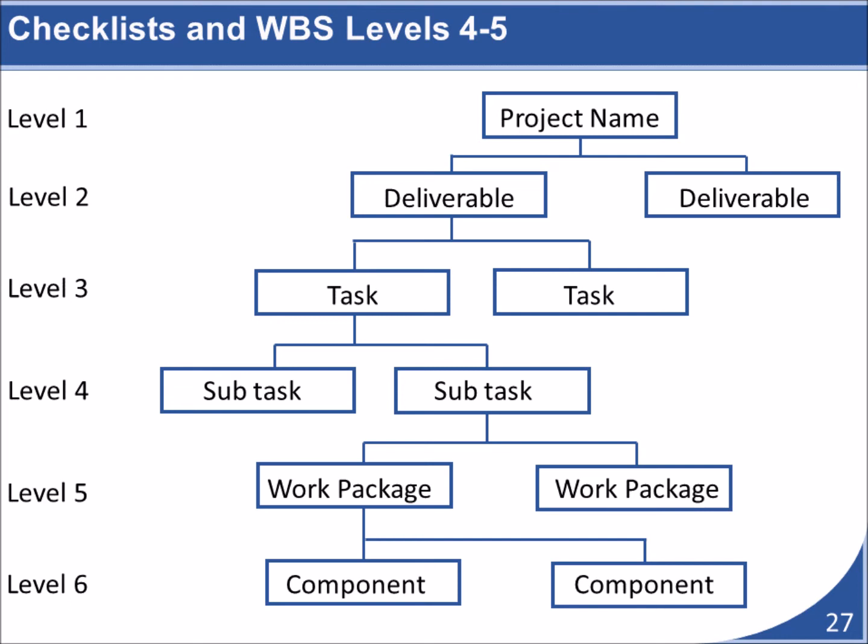Our project WBS and scheduling tools are great for showing the managerial level of a project. That's the first 3 levels of the WBS, but there exists a considerable amount of additional information that is not captured using these managerial tools. These lower levels of the WBS detail are usually recorded within checklists, procedural documents, or modeling tools such as a flowchart.